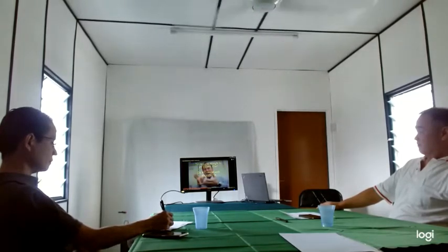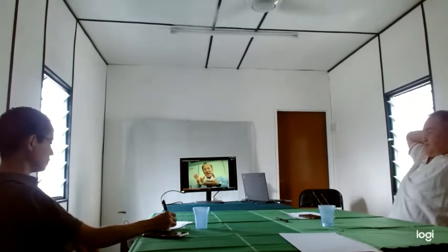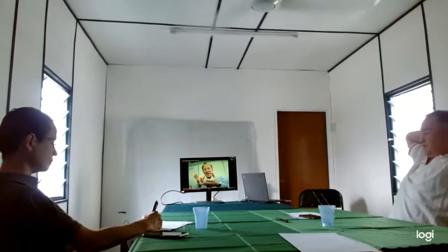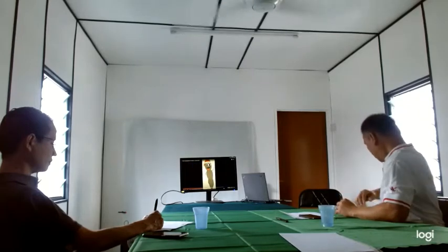The Gantt chart shows each task against a time scale along the horizontal. So it shows how long each task is expected to take. And it's based around the critical path. So you draw the critical path in first, just going down corner to corner. And then you put in all the floating tasks, the non-critical ones.